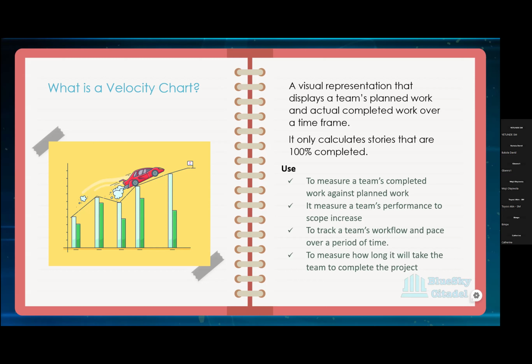And then we started working, and then they started bringing new things in and all that, all because Agile says you can respond to change, you can change things. Yes, that's fine. Agile says that we respond to change, we adapt. But the business and the stakeholders also need to know that if we keep having that scope creep, where your scope just keeps increasing, it's going to cause an extension.